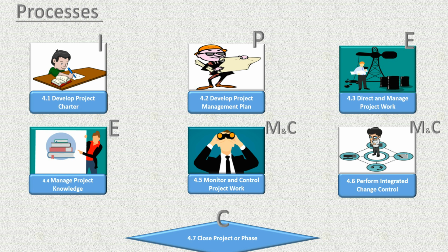Now let's discuss why develop project charter is kept under the initiating process group. That's because develop project charter is part of initiating the project. Until and unless we have an approved project charter in hand, we cannot start planning the project.